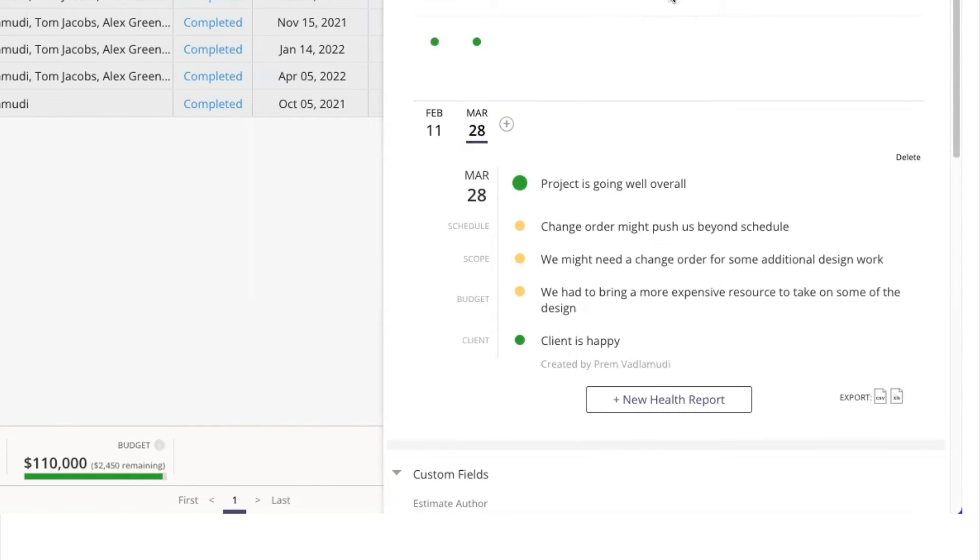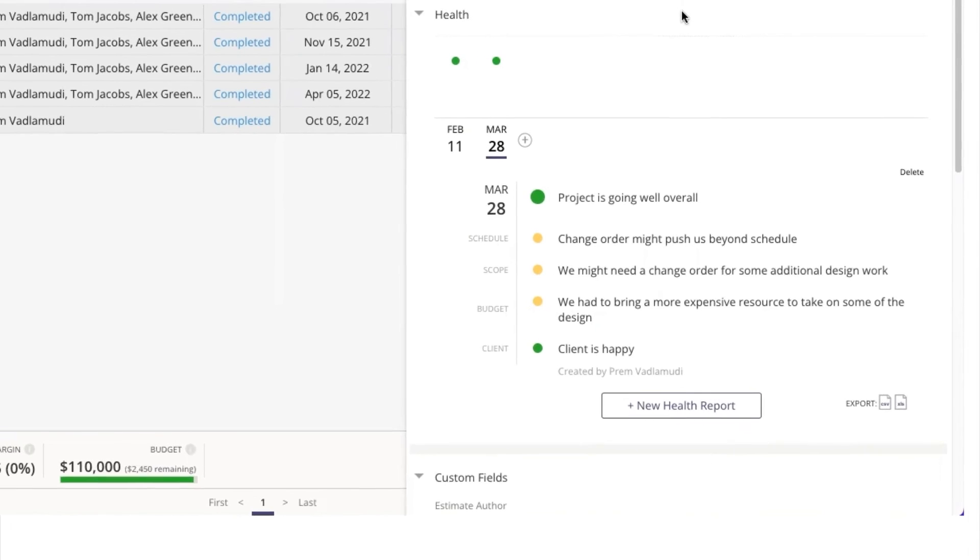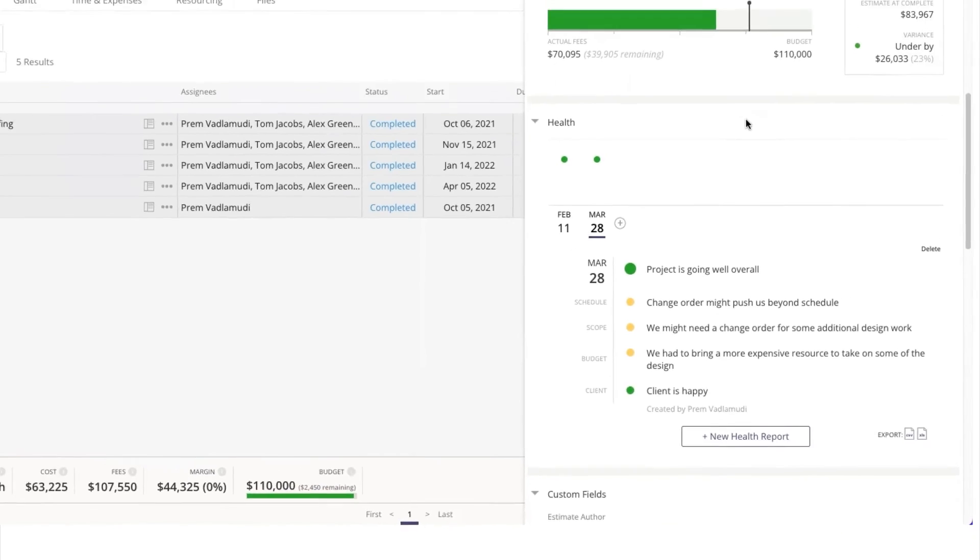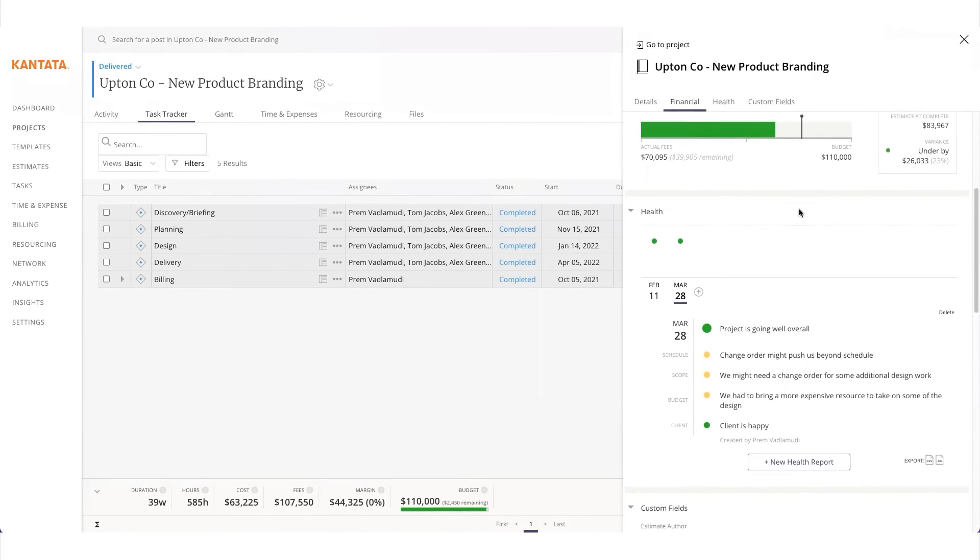Estimate to complete and project burn are available at your fingertips to make proactive decisions that will ensure client satisfaction. With all the data that is captured in the previous stages, including the estimate baseline, the resource planning, and the actuals from time entry during the project delivery, we have all the information we need within a single tool to get an understanding of true revenue and cost and projected revenue and cost.